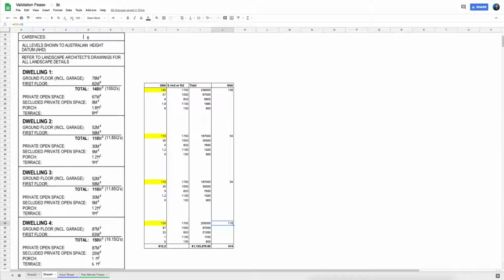we are going to build and what we'll be able to sell, because a dollar per square meter rate is different when you're selling it, and a dollar per square meter rate will be different when you're actually building it, because building would require the entire area to be built, but when you sell them, only the living space is counted in most countries. But if in your country everything is counted, by all means you can put in any number you want over here, so long as you know that this is what is taken into account when you are selling them, or the selling dollar per square feet rate or the dollar per square meter rate is considered to be. So let's come back to the input.